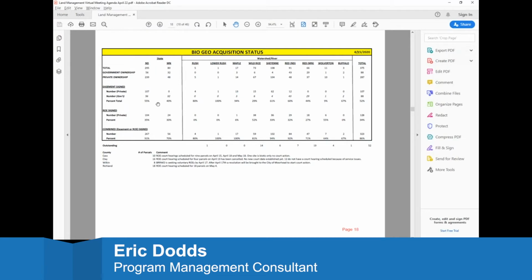We're making good progress. One of the challenges we've found is that the statutory requirement requires us to get a confirmation of receipt when we send letters to property owners. Some property owners have been resisting signing for their mail, or avoiding the service officers. So we've run into delays in our ability to serve those property owners, and we're trying to navigate through that and use commercial delivery and other mechanisms as possible.